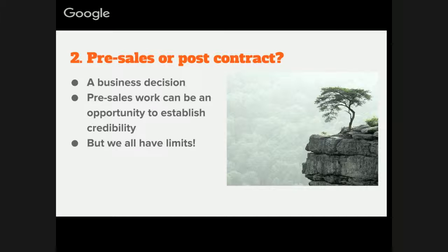So yeah, there's a decision there, and it's sort of a personality choice to some degree, or a question of your business model and who you're working with. Obviously, it varies a lot, but it's the question of how much work you do in closing the critical pieces of the gap. A common example is, what's the architecture of your system? What technologies do you need to use? Less technical clients don't know the answer to that. That's honestly why they're hiring you, potentially. But that's a big question and can massively influence the estimates and the budgets and the project overall.